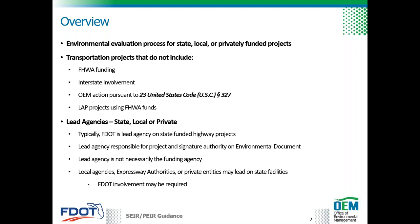Local agency program or LAP projects that use federal highway funds are also considered federal projects and are not covered today. This training will focus primarily on state funded projects in which FDOT is the lead agency. However, we'll also discuss projects on state facilities that may be led by a local agency such as a county or city, or by an expressway authority or other private entity. The lead agency is responsible for the project and has signature authority on the environmental document.